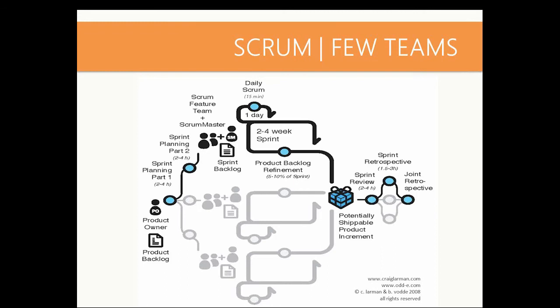Part 1 is about selecting which work will be delivered from the backlog, and then after that joint session has finished, the Scrum Masters plus the other people from the individual teams go back to the individual teams to finish sprint planning, talking about how will we develop all those selected user stories. After that, it is sprinting per usual.